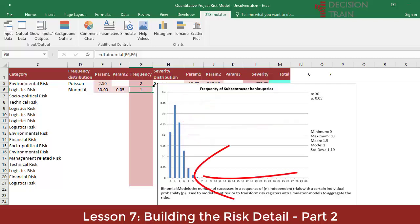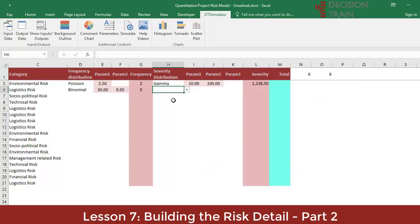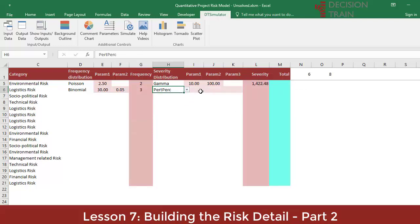That five or more bankruptcies occur, given a set of 30 subcontractors where each one has a 5% probability of bankruptcy, is highly unlikely. Let's model the severity of this risk with a PERT PERC. This is the same as the PERT distribution, but the minimum and maximum parameters are expressed as percentage differences with respect to the mode or most likely value.